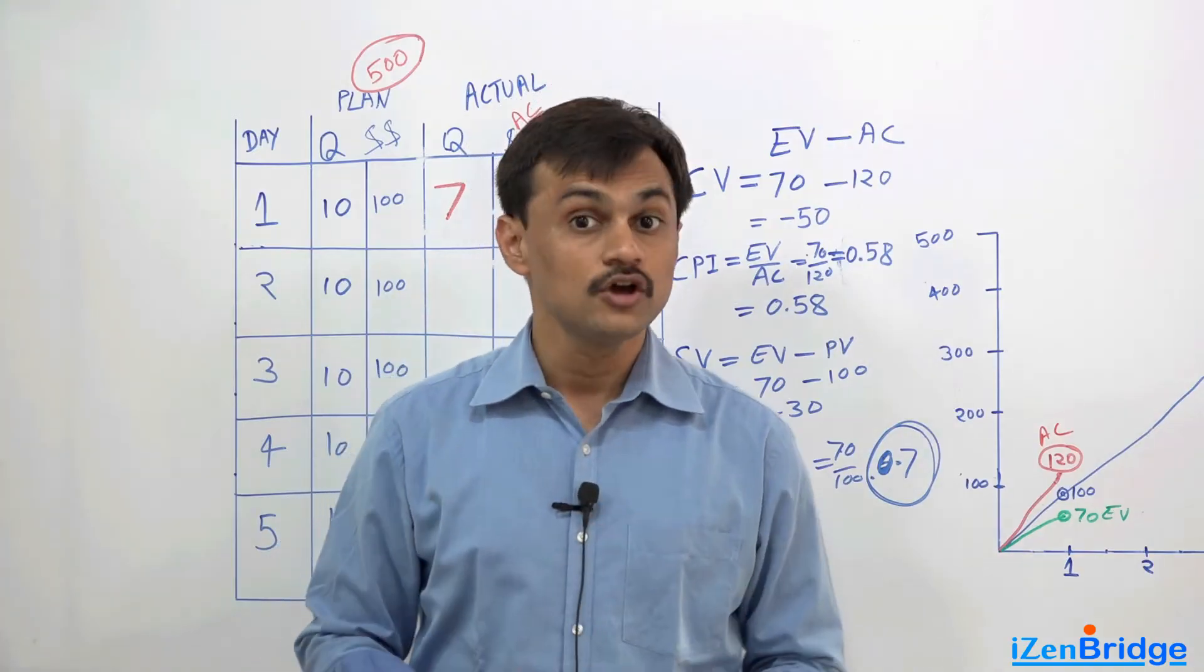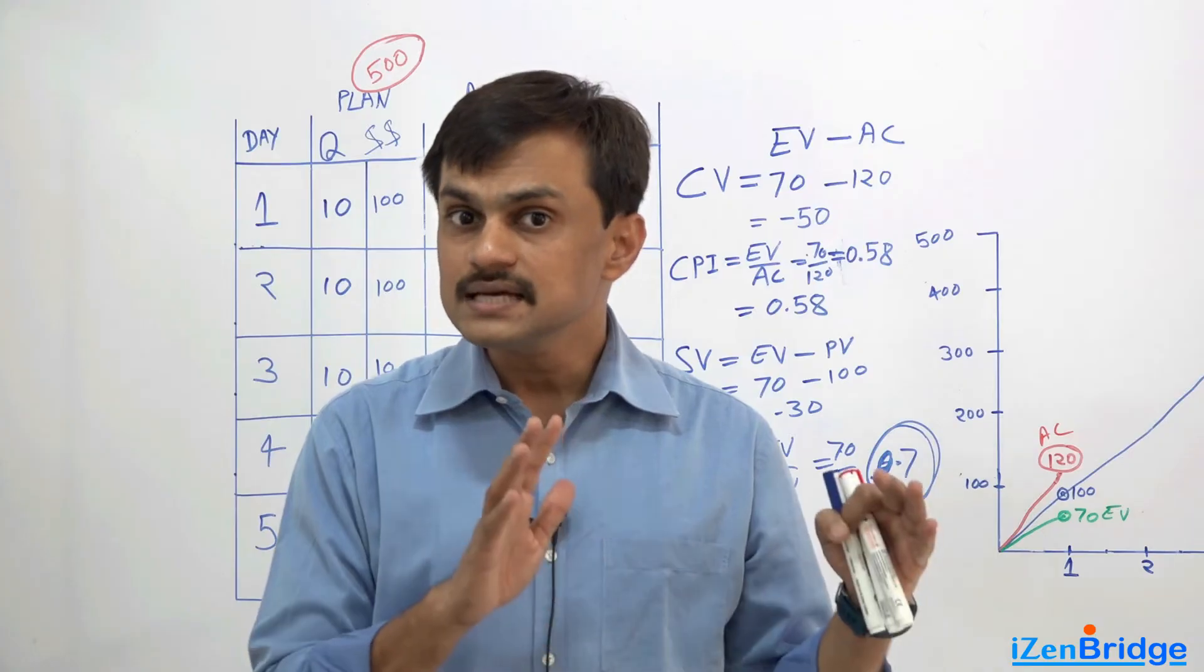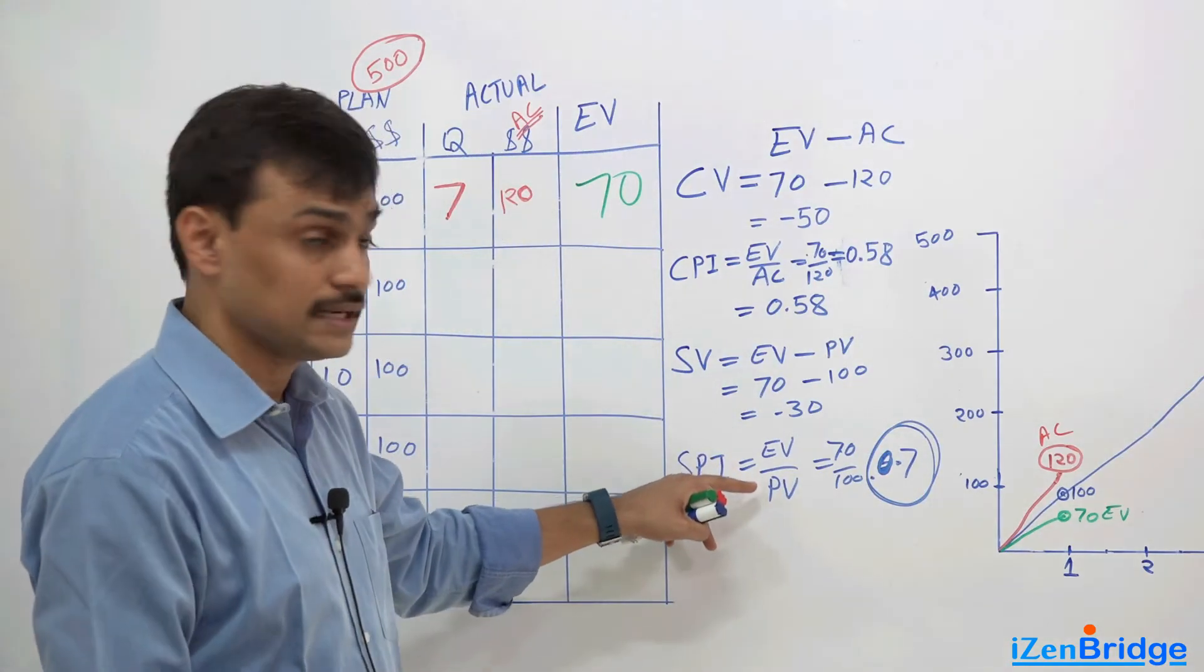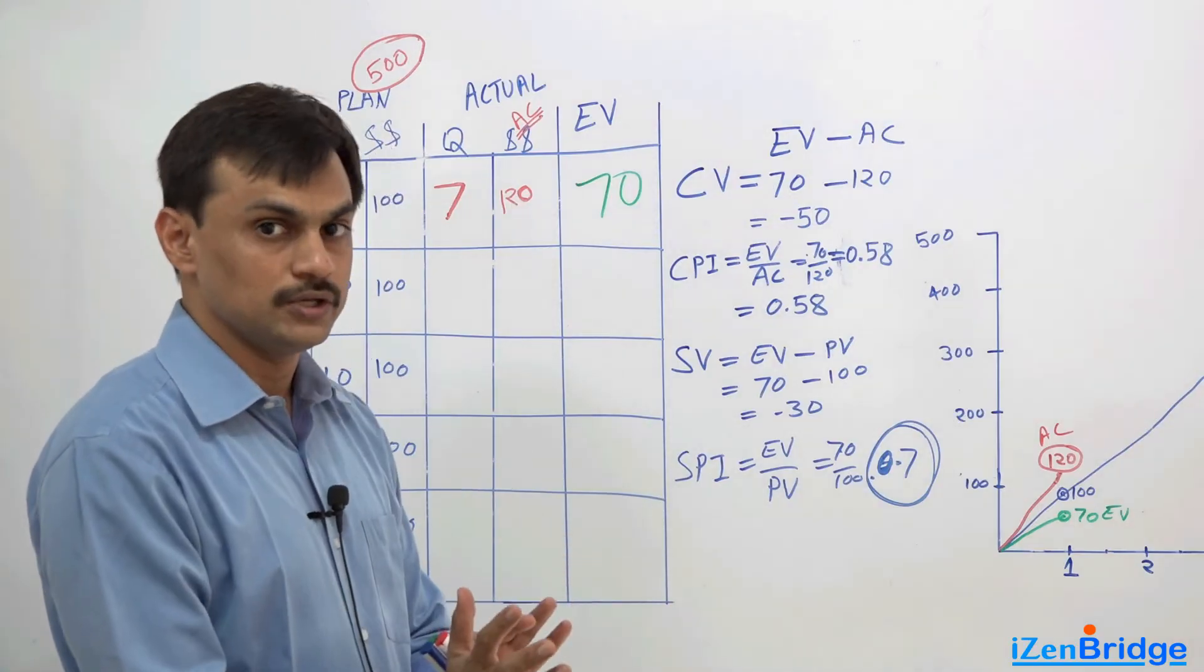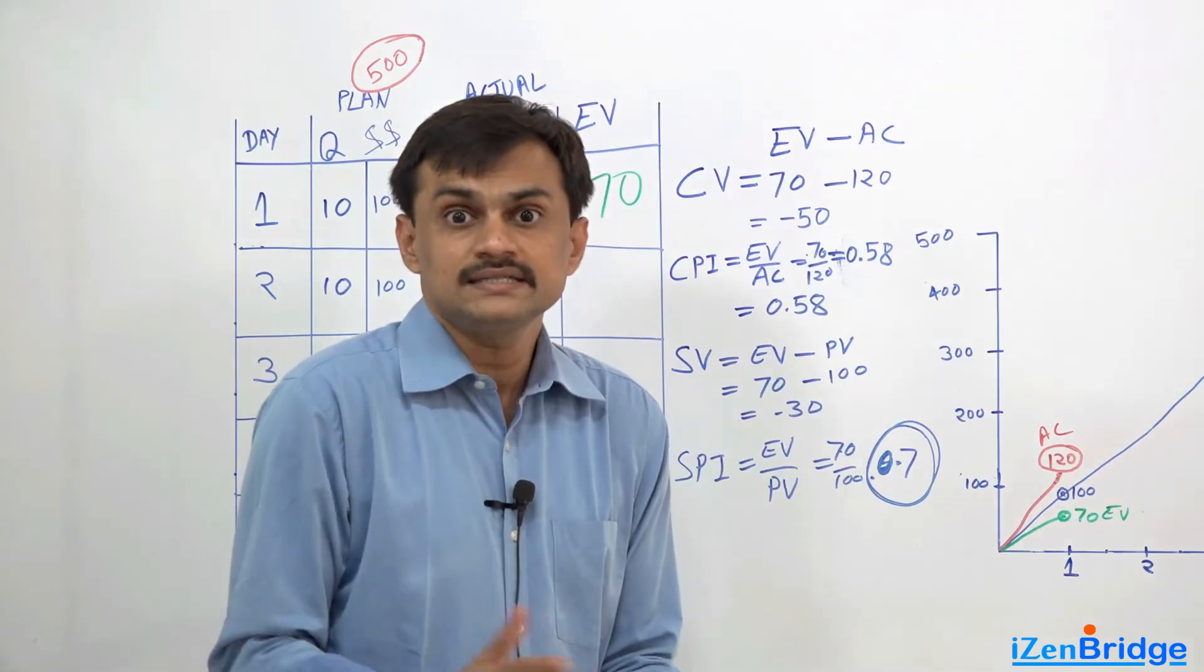If it is more than 1, it means we have completed more than planned work. It has nothing to do directly with the actual cost. You see, the actual cost is not here. It is only about earned value and planned value. So we planned to have 100, but we earned 70.